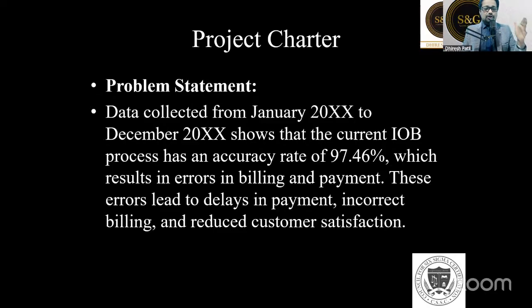That's why they have given January to December. You can take April to March as a financial year as well. Western countries follow the January to December cycle, and we follow the April to March cycle. It depends, but at least 12 months. You don't have to follow only the financial cycle, but you should consider at least 1 year of data. Do not define your project on the basis of only 1 month, 2 months, or 3 months of data, because that may not give us the right picture.